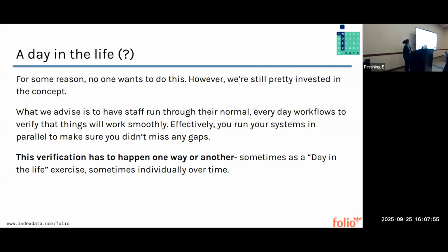And then we have the thing I have never managed to sell anyone on ever, which is our day in the life exercise. So for some reason, no one wants to do this really cool thing we came up with. However, we're still pretty invested in this concept. So what we would like people to do, what we think would be an ideal thing for people to do, would be to try and run your legacy system and your new system in parallel for a day, right? Just make sure that the normal things that you do in a day are working so that we know that on day one of your go live, nothing's going to be broken, right?